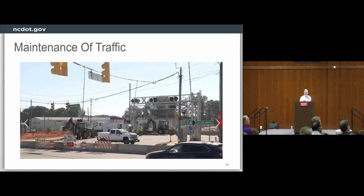This led us to closing the crossing after the 2022 State Fair. This was done so that the work for the detour track construction could begin, as well as building the Hillsborough Bridge, the Railroad Bridge, and the Barrel Bridge over Blue Ridge.